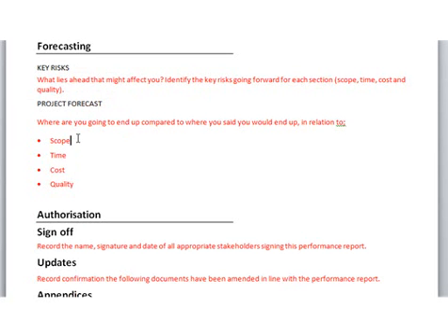So for example, in my website design project, the customer may decide to add in some more multimedia design, or they may want an extra 10 pages or something like that. So here under the scope section, I'd talk about all this additional stuff that this client wants and how that's going to blow the scope out. In contrast, the client may have decided to go from a 10-page website down to a 5-page website, and here I would just discuss that the scope has changed, it's been decreased, and that there will be impacts on time, cost, quality and other things.